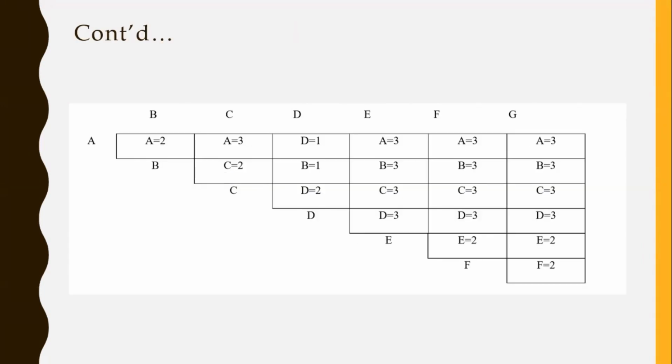Compared to A, whether it is most important or least important, that ranking definition is not here. So A2 means A is better, and compared to A and C, again A is better. Compared to A and D, D is better, but the degree of betterness is represented by the numbers 2, 3, 1, and so on, right? So for A, total it receives all the A's, you need to add 2, 3, 5, and then 9.